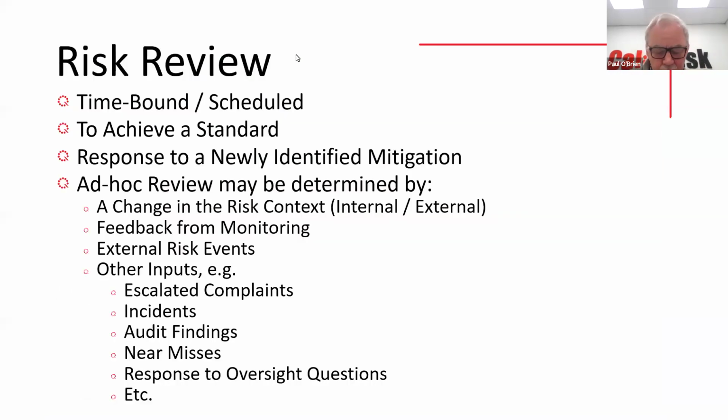So risk review. When do we do the risk review? Well, a couple of ways and a couple of inputs. So first of all, it's time bound. So when I say it's time bound, use a time-bound risk review, so scheduled. Some of these will be mandated or strongly suggested in the regulation. Sometimes they're looking for a policy review on an annual basis. If you're doing a policy review, you might as well have a look at the risk as well.